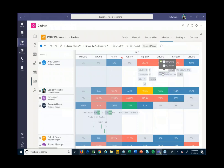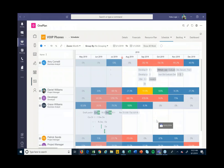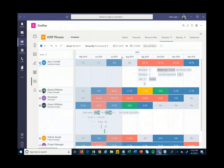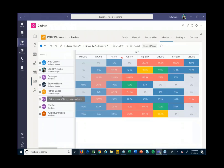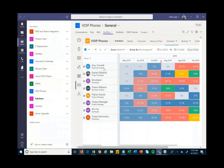For example, Grace Williams has availability to help out, so I can drag and drop a task down to Grace and have her take on that particular piece of work to avoid resource issues. You really get that full view across all projects, not just within this particular project.